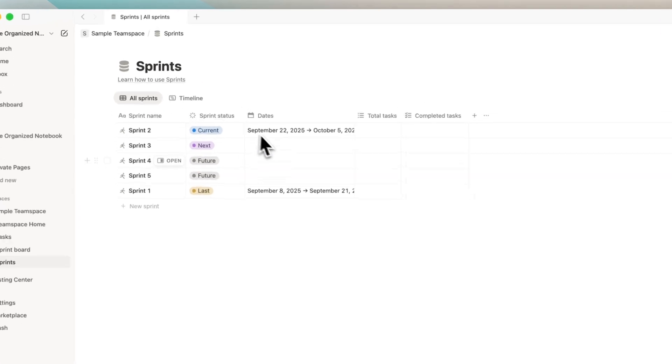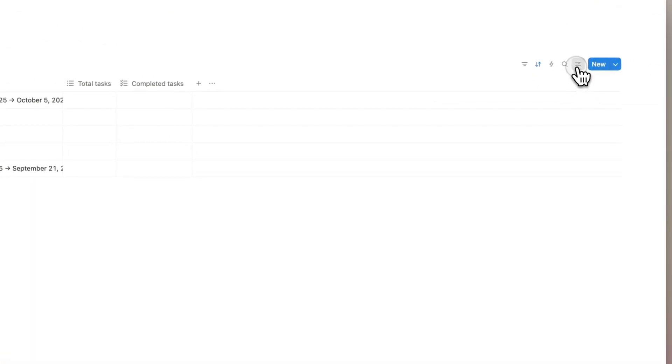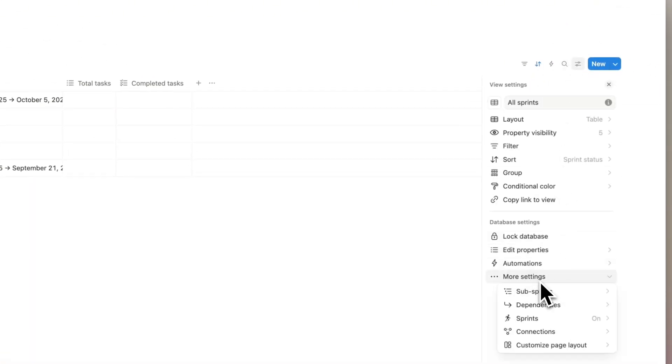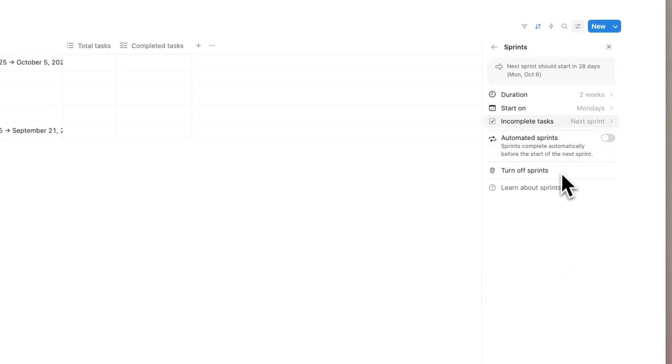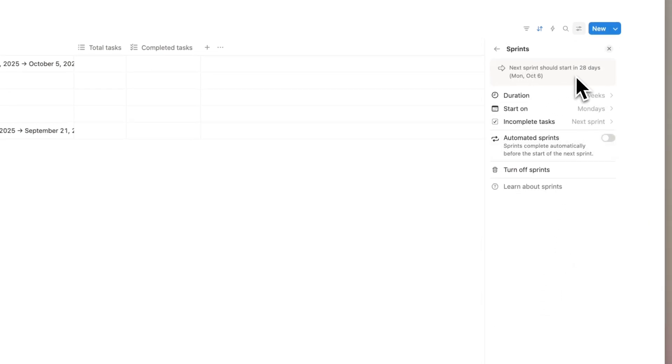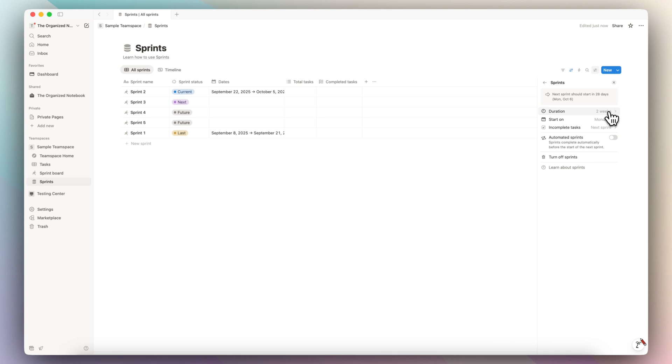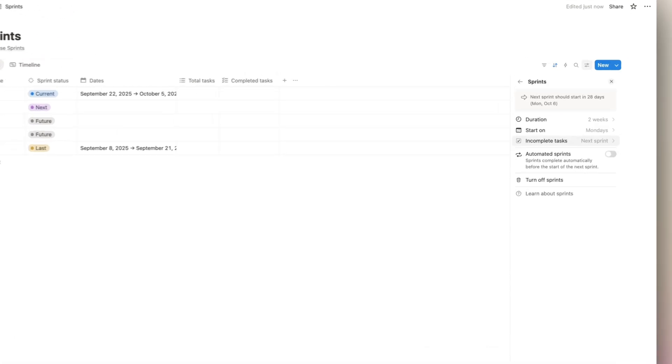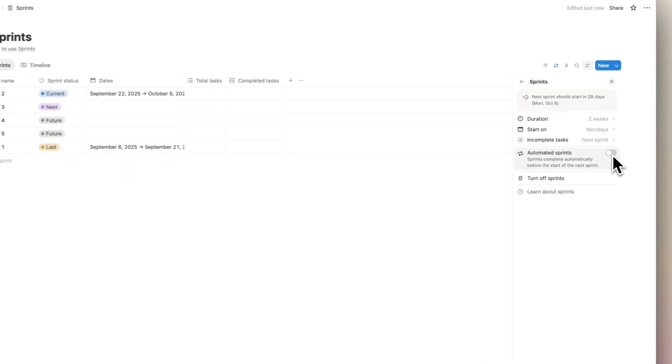And one other thing you can adjust with the settings is by going to the settings icon here, go to more settings, sprints. And here you can see when the next sprint should start, the duration of each sprint, start on dates, what you usually do with incomplete tasks, and then you can also automate the sprints by toggling this on.